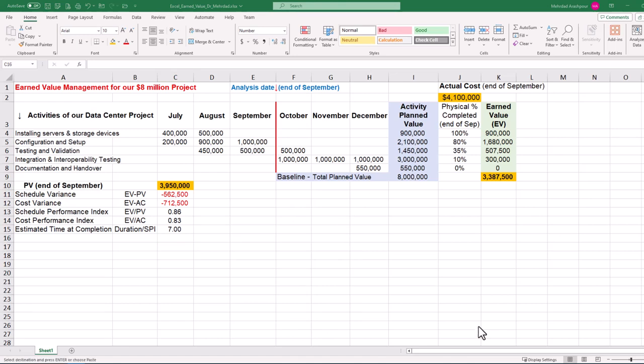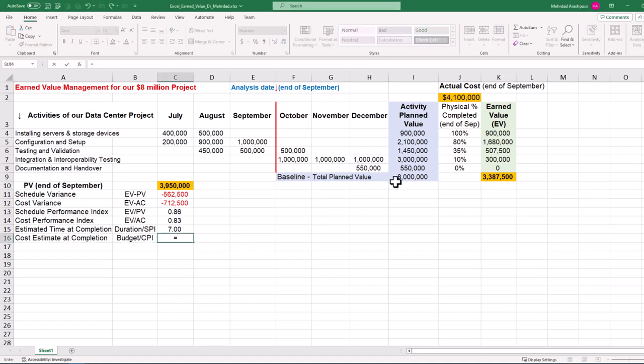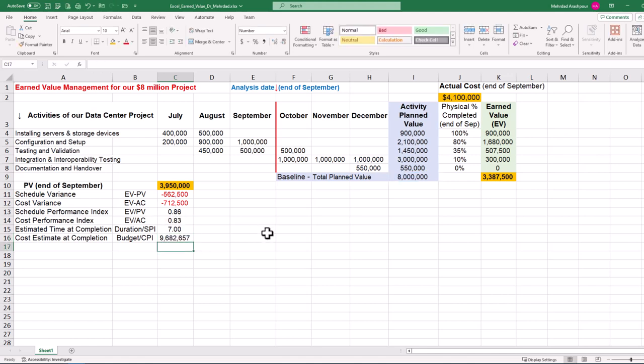We can also calculate cost estimate at completion or EAC by dividing the planned budget of $8 million by the cost performance index. The high EAC of $9,682,657 indicates our data center project is expected to exceed its planned budget. This cost overrun could result from various factors such as unexpected expenses, scope changes, resource constraints, or inefficiencies in cost management.